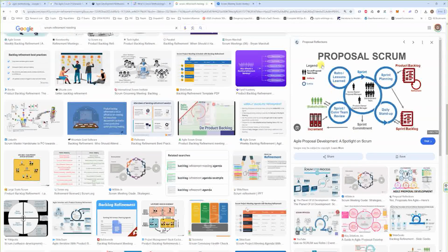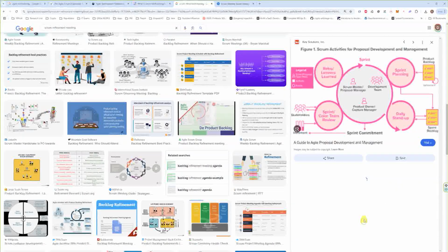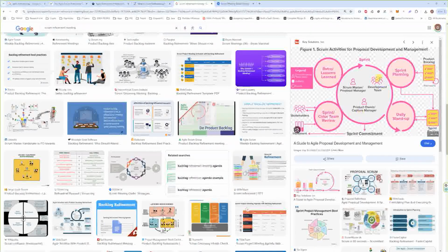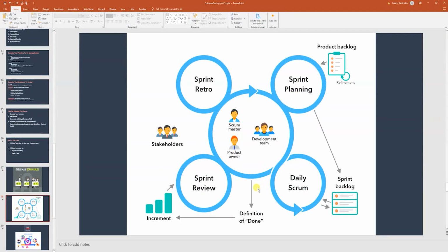Okay, however, there's a task missing here. The refinement meeting is very important. I don't even know why it's not here. It's one of the most important meetings, because it's where the business analyst will come and say, okay, this is what we need to build. He's going to explain everything to the team and say, these are the requirements. Then the team can ask questions: what about this? What about that? Do we need to do this? And that's what I'm going to practice with you guys today. You understand? We're going to go through a refinement. The refinement is a preparation.